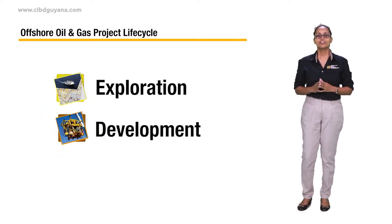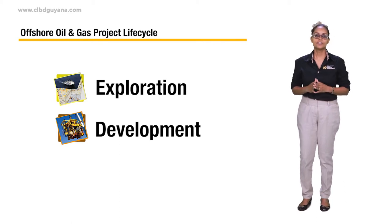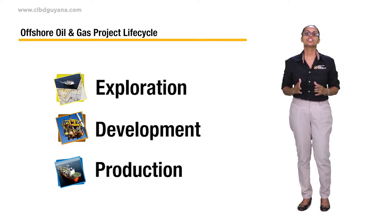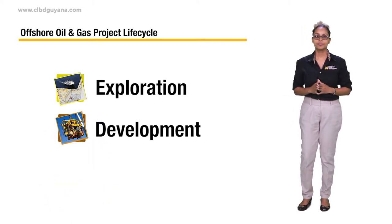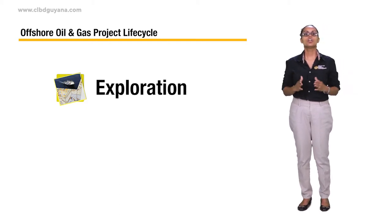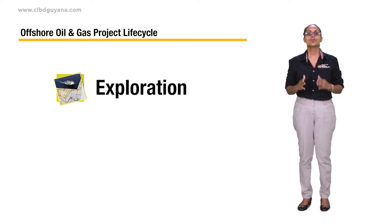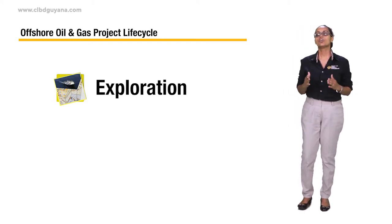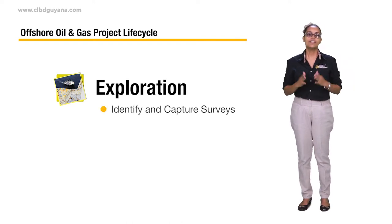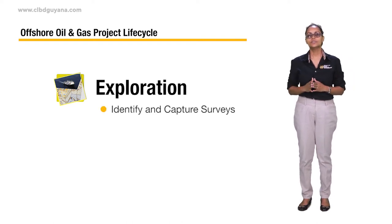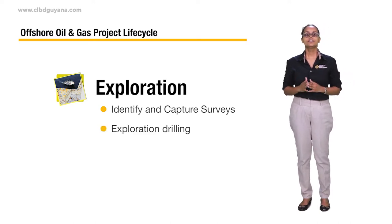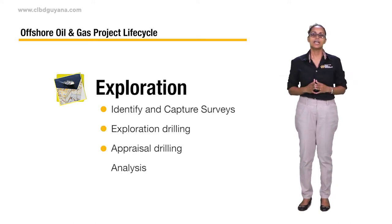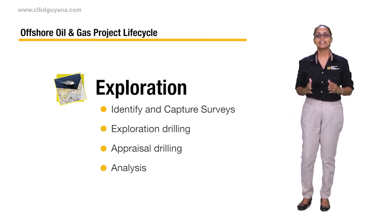Development, ranging from 1 to 5 years, and production, 15 to 30 years. Exploration involves all of the activities needed in order to locate oil and gas reserves, and these include technical surveys by geologists, exploration drilling, appraisal drilling, and commercial analysis.